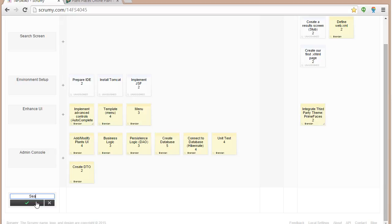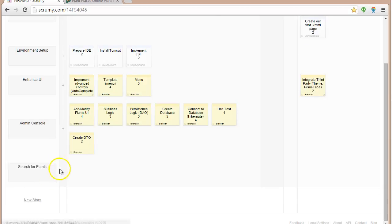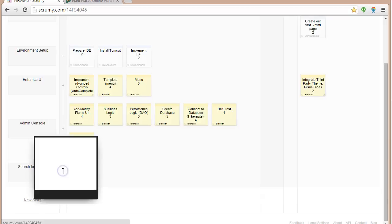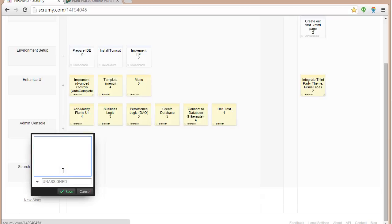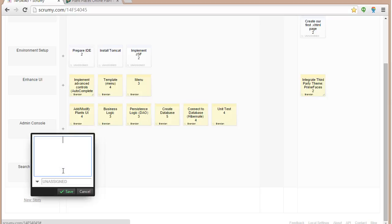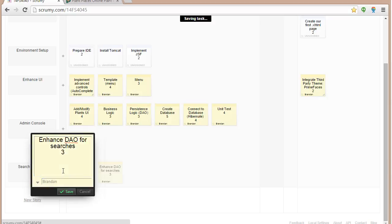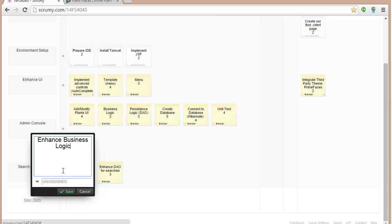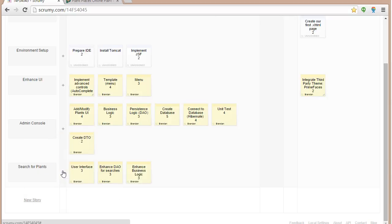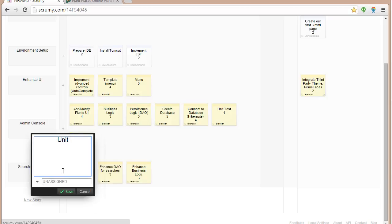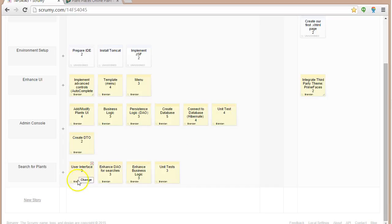After that, we can do a search for plants. We can only search for plants once we've had them. So for this one, we might have user interface. We'll say maybe three hours on that. We might have enhance DAO for searches. Since we've already created the DAO above, we'll give that one three hours. And we'll say enhance business logic. Now, business logic, sometimes you'll hear that integration layer, service layer, something like that. So you might see me use those terms interchangeably. And then once again, we'll create some unit tests for this. We'll make that three hours because we've already done a lot of the testing up here.